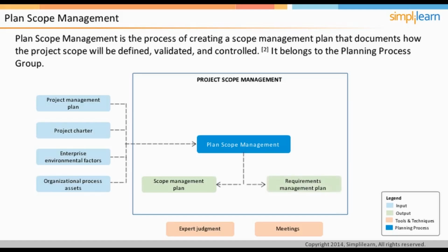The Requirements Management Plan is a subsidiary of the Project Management Plan that describes how requirements will be analyzed, documented, and managed. A requirement is voiced by a customer or a stakeholder, whereas scope represents what the project team will do or deliver in order to meet that need. The Requirements Management Plan may also describe how the configuration management of requirements will be carried out, how they will be prioritized, how the metrics will be used to rationalize these choices, and how the traceability of the requirements will be maintained throughout the project.